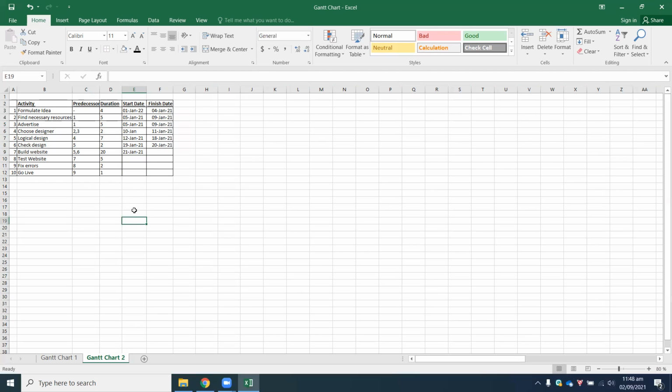Now, this is how you'll separate it. We know that there are 10 remaining days left in January. So it will make it 31st of Jan. So 20 plus 10 gives you 31. Therefore you have 10 remaining days left. From here, you'll take the value of 0, since you're including 1 in your duration as well. So you take the value 0 of Feb. So 0 plus 10 gives you a value of 10. And then finally you'll do minus 1, which will give you 9th of Feb.